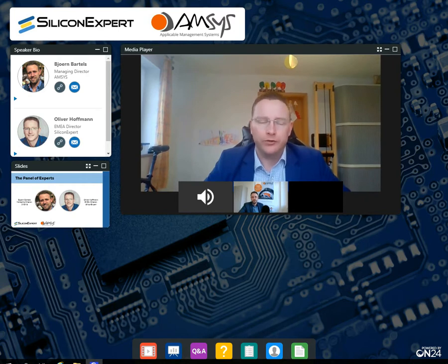The question is when. If you have no second source, meaning you don't have an approved second source in your ERP system at this moment, then you probably want to fix this now, or you would have fixed this 3 years ago. If you do have a second source for the according item, then you just flip the priorities and you can continue producing. But now I no longer have peace of mind. When I am receiving the PCN for the second source, as long as I don't have a third source, I will have to react quickly. This is when the wrong process kicks in.